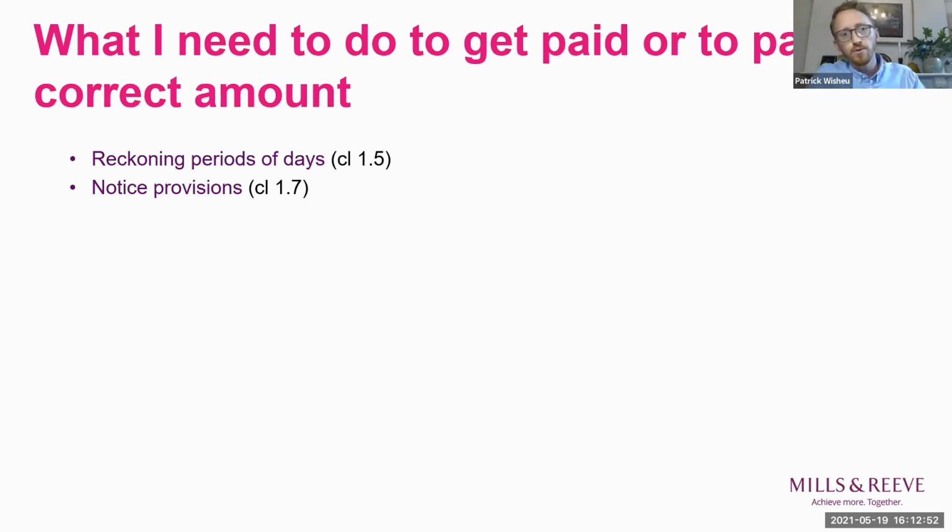The thing to note, though, is that when you're counting these days, you count weekends, but you don't count public holidays. And public holidays are defined in the JCT as bank holidays under the Banking and Financial Dealings Act 1971. So rather arcane reference there, but it is essentially just the bank holidays you expect. So Christmas Day, Good Friday, Easter Monday, New Year's Day, the May bank holidays, and so on.